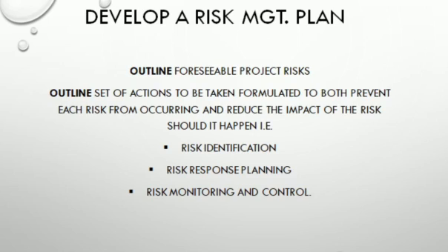How do you respond if that kind of risk should occur? One of the things you can say is, okay, let us use tarpaulin to cover the surface of the pool, so that in case rain falls, it will not tamper with the materials as well as the aspect of the job that you have been able to accomplish. And the next thing there is risk monitoring and control.